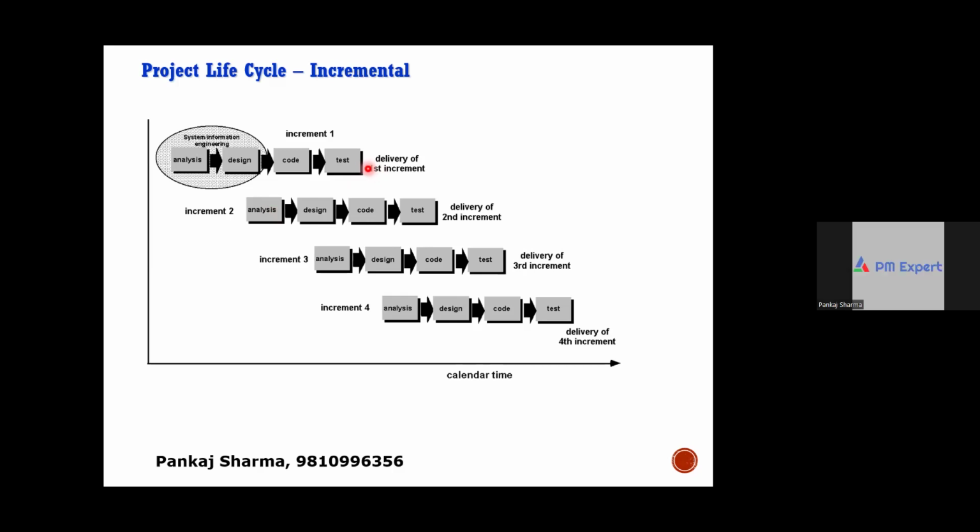Now, apart from this, many times the benefit of doing a project incrementally is that the benefit realized from the first phase can be used to fund the subsequent phases. When you roll out a project in a phased manner, you will have benefit realization from the first phase. Can it be used to fund the subsequent phases? Yes, absolutely. If funding is a constraint, then also this model will help you.